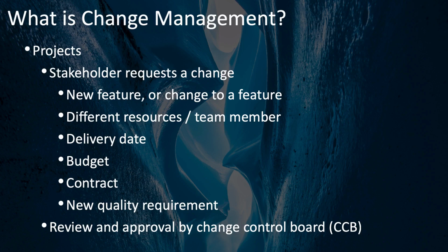You gather the details of what this change is, do a little bit of digging and analysis to make sure you fully understand what this request is and that the stakeholder fully understands what they're asking for. You may also have a situation in which you need to use different resources for your project, or you can't get the team member you had hoped to get and you need someone else, or there's a necessary change in your team membership. Perhaps someone gets pulled off onto or needs to be pulled off onto another project. These kinds of requests from your stakeholders are also change requests that need to go through your change management process.